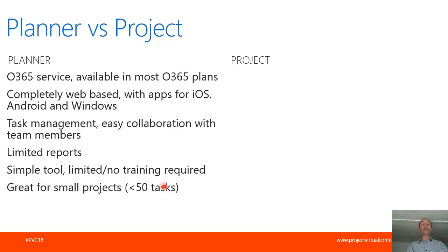And I think it's great for small projects, so circa less than 50 tasks. Maybe your boundary is 20 tasks or 100 tasks. But it's not a sophisticated tool. So if you've got thousands of tasks on there, I wouldn't use Planner. Partly because I think the interface of a web page isn't the right way to look at 1,000 tasks. And there's no way to report out on 1,000 tasks, etc.